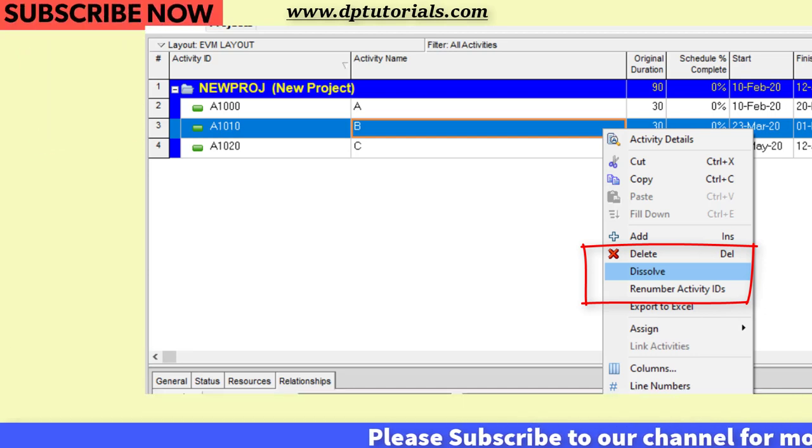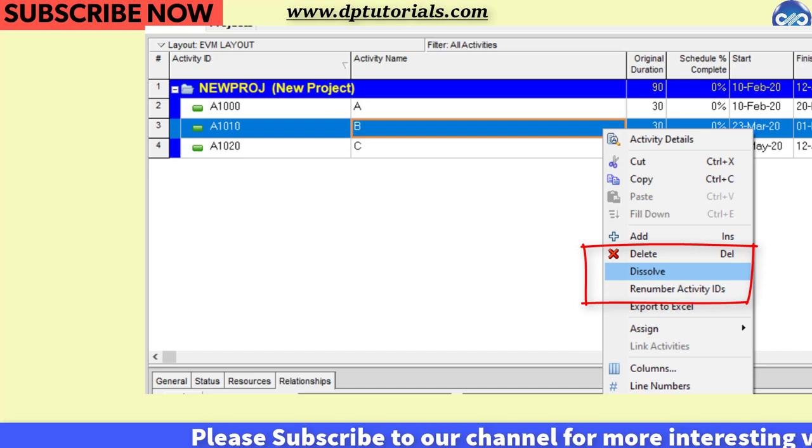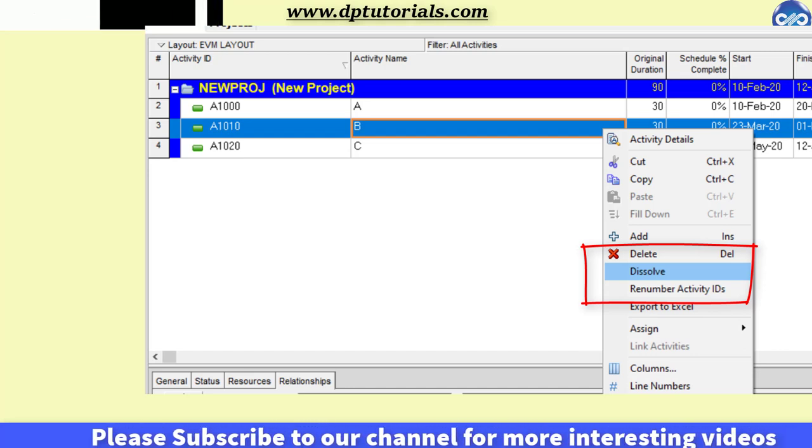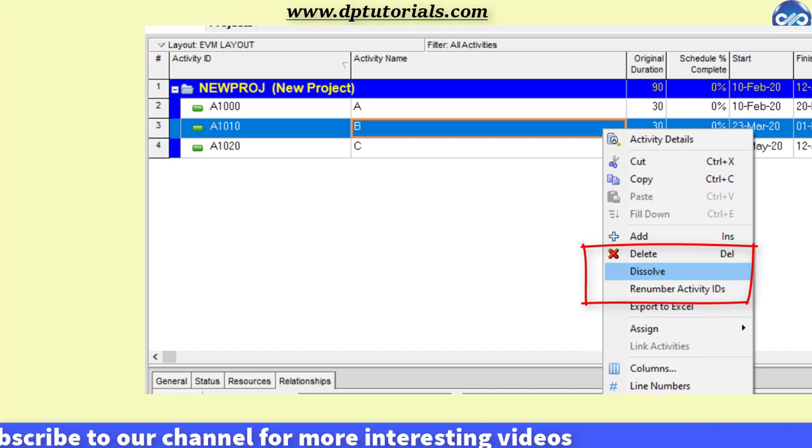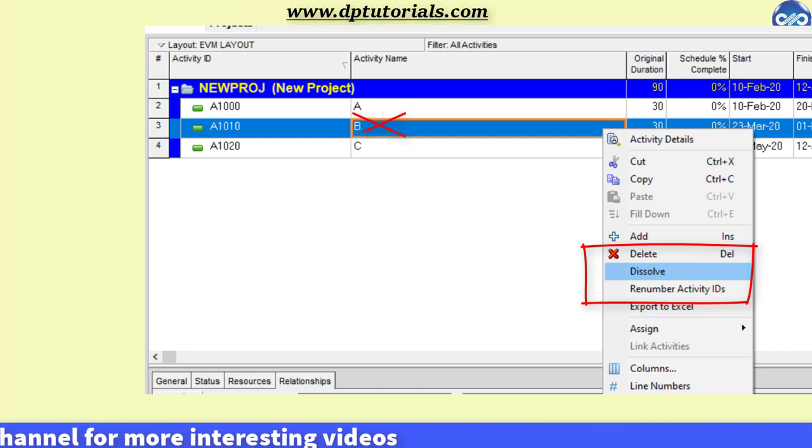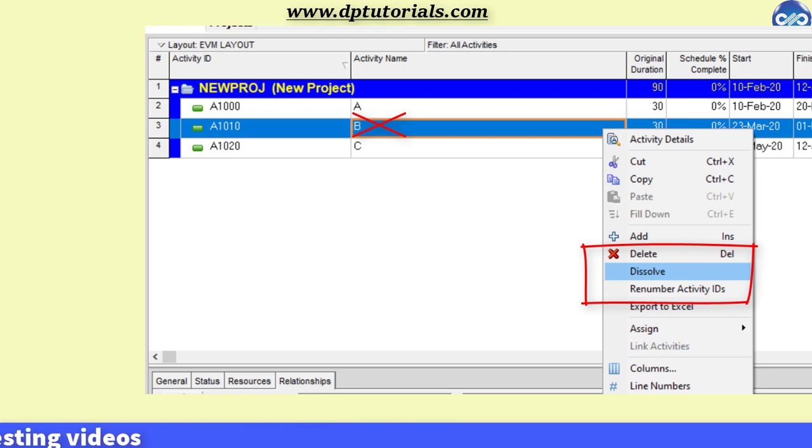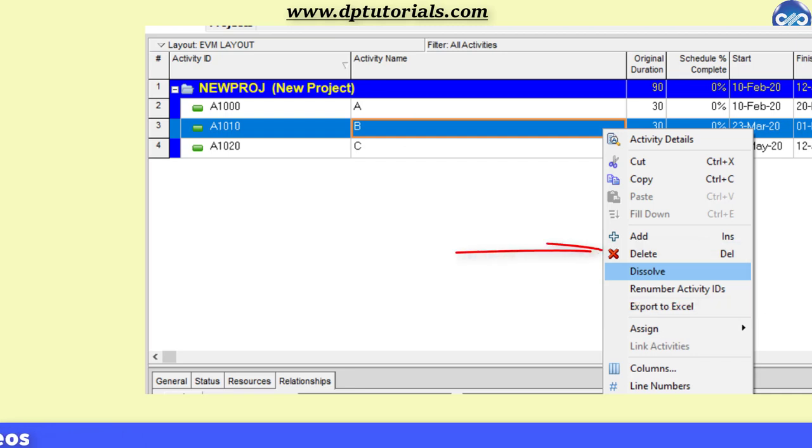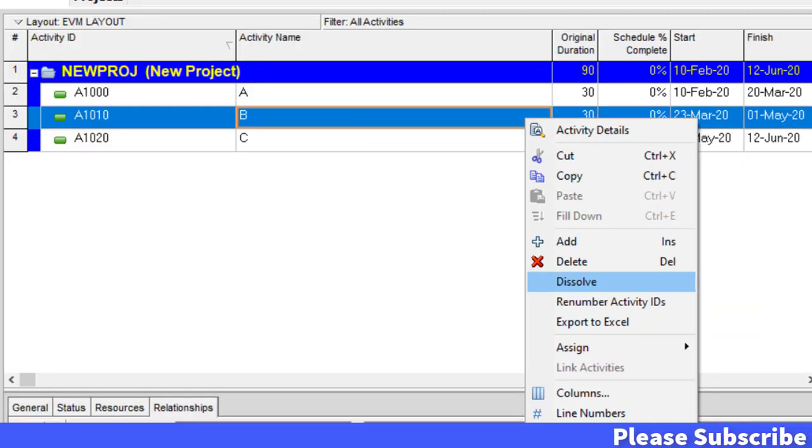As part of project scheduling, you might feel that some activities are no longer required when there is a change in the scope of work. Some users simply delete the unwanted activities, but by doing that, the relationships will also be removed and the linked activities will then become open-ended, which is not recommended.